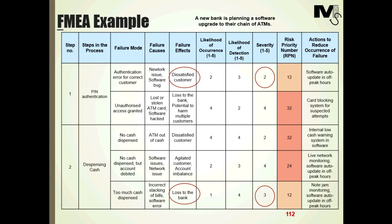Based on the ratings, we have RPNs, and the RPNs are added to get a total RPN for the process. The RPNs are colored red, yellow or green based on the RPN thresholds finalized by the team. The total RPN value will help the team understand if this process should be prioritized over other processes which will have their own RPN totals.